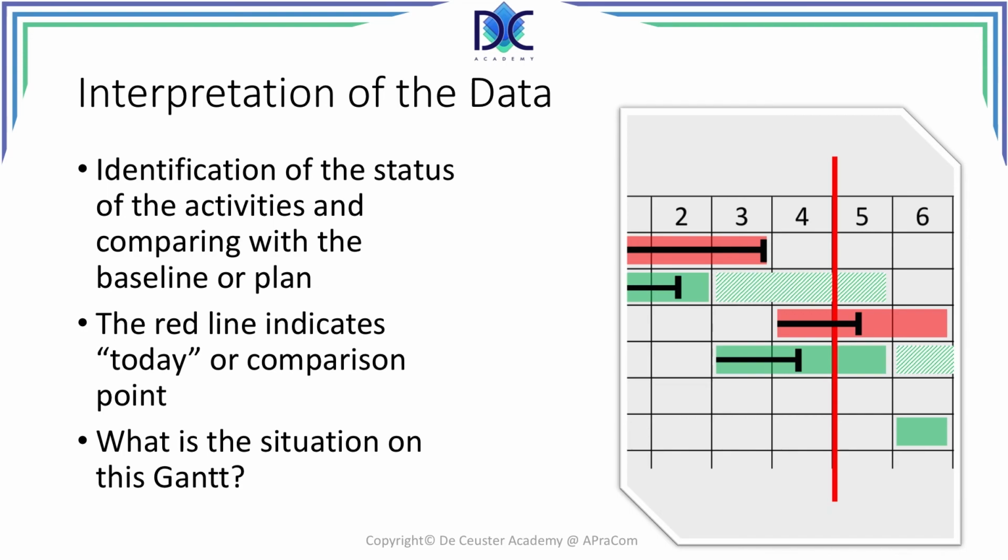Here is a little bit more detail of the same element that we had before. You have to be careful. You see that activity B has a problem. Will that problem create more problems? We have a phenomenon here that we could call critical path convergence. The fact that activity B is taking longer means the slack of that path will be reduced, and the project manager has to review what will be the effect on the duration of the project.